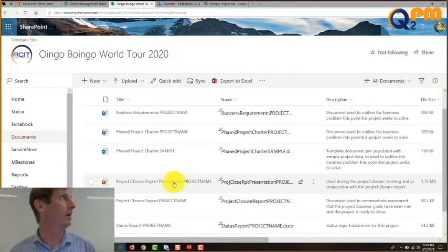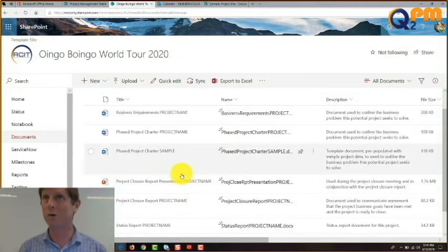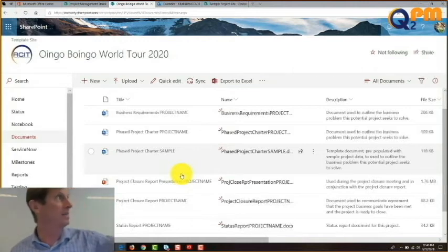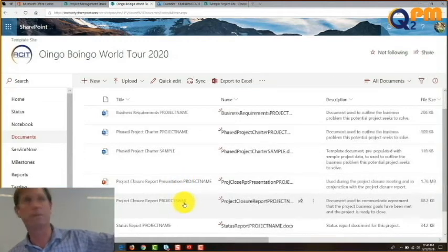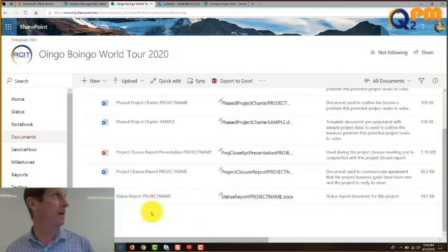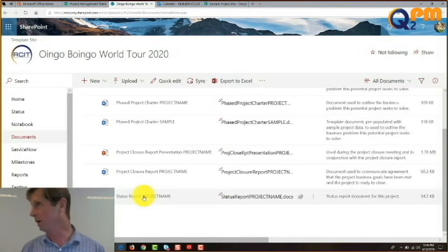content was laid out. Then down here, we have something called the project closure report presentation. That's a PowerPoint presentation. Remember I told you about that last meeting? You get up in front of everybody, you say, hold off, no drinks until we're done with the agreement, right? This is the presentation you give them. It's a PowerPoint. Then we have the phase project report. That's the actual handout that you give them that corresponds to the presentation. Then we have the status report. We'll talk about that another time. That's a really important document.